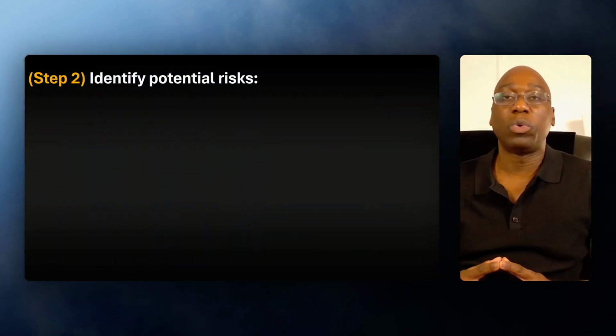A lot of times when I am coaching change managers or project managers, they normally come up with this question, which is, hey, Obi, how do I go about identifying potential risk? My recommendation is you can use surveys, right? You can send out surveys. You can do workshops to engage with selected SMEs or champions to gather information. You can also do brainstorming sessions to ensure that you are gathering a comprehensive list.